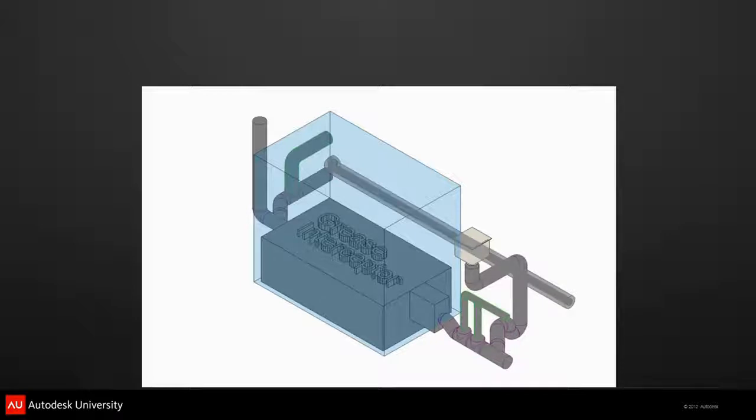All of that effort in modeling the piping and coordinating around it was just trash. And it created a lot of coordination problems. We had areas where things wouldn't really fit together because now the piping was going through ductwork that was already in tight areas. So when you think about these family objects, make sure you get everyone's input. Don't just download a manufacturer's product and think that's what will end up on your job.